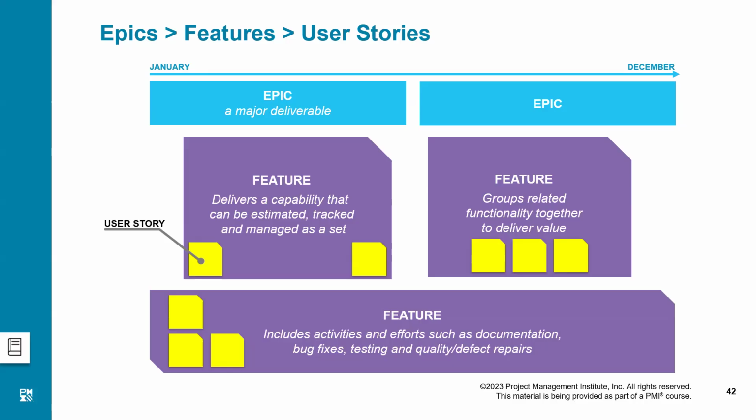Every user story should be doable in 2, 3, 4, or 5 days. That way, because we are multiple people, we are 10 people, we can accommodate, say, around 20 user stories in an iteration.